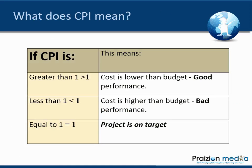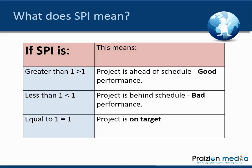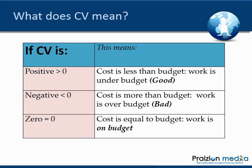For any index, remember: greater than 1 is good, less than 1 is bad, equal to 1 is on target. For CPI — Cost Performance Index — greater than 1 means cost is lower than budget, less than 1 means cost is higher than budget. For SPI — Schedule Performance Index — greater than 1 means ahead of schedule, less than 1 means behind schedule, equal to 1 means on target.